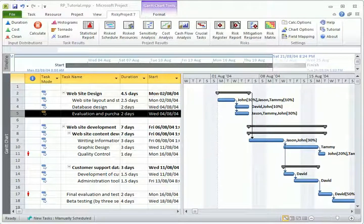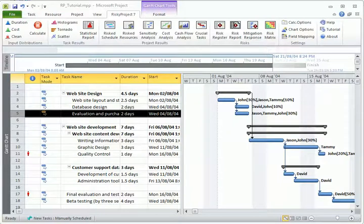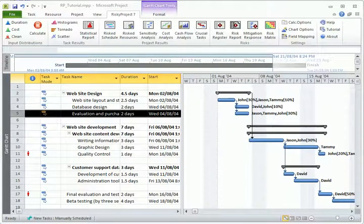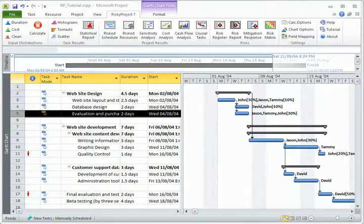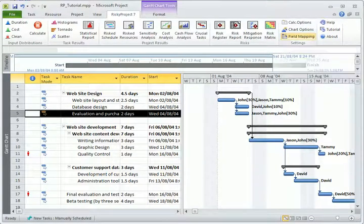you can display the risk-adjusted project schedule. Low and high task duration and cost are saved in different fields in Microsoft Project. You can map these fields with risky project data using this dialog.